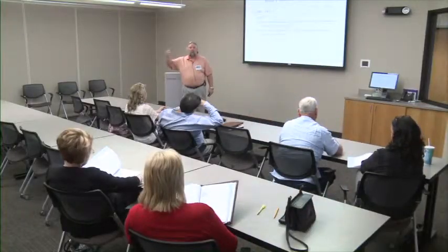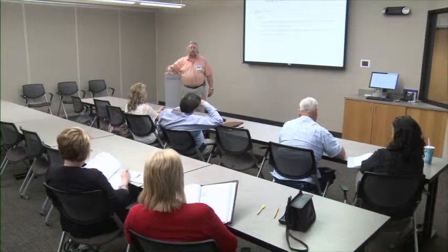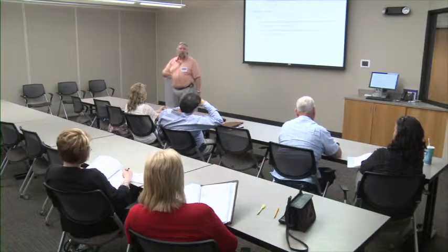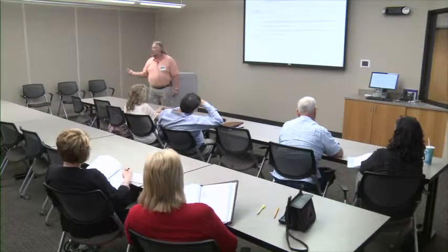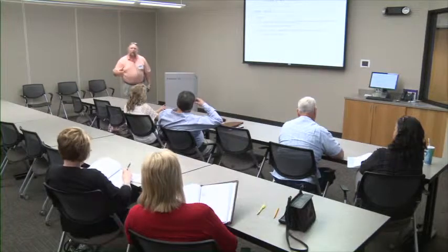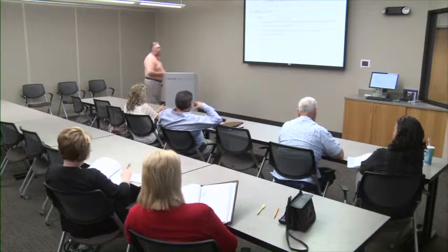Okay? Logic driven, updated by numeric calculations with remaining duration. Simple process. The computer updates the stuff. As you click and go through it, you can say if I'm 2 weeks in, you can mark that you're finished with 2 weeks worth of work. It'll go through and recalculate all your durations and say what's done, what wasn't done, what needed to be done and didn't get done. You can look at lots of different things and let the computer do it for you.